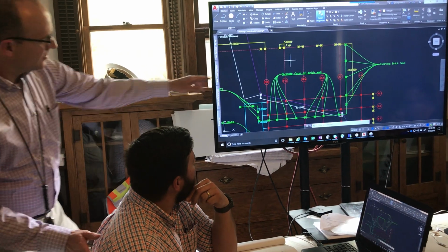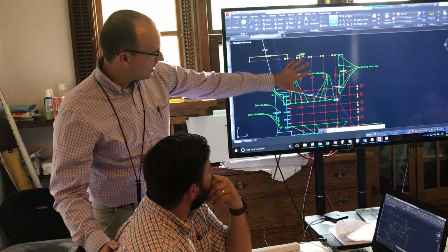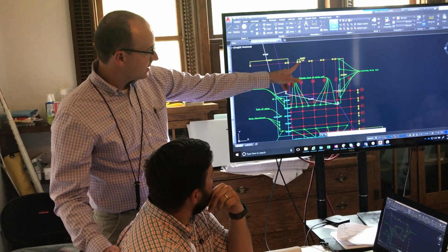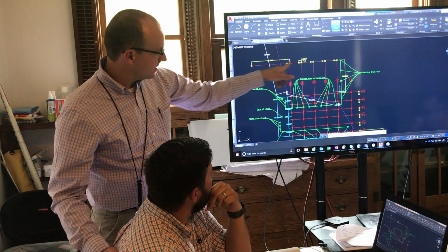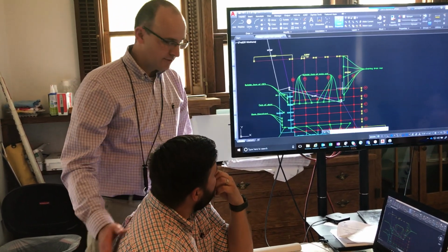Let me just say one thing. So to Jake's point, you can set up a total station. You can set up a robotic total station anywhere. If you set up a conventional total station, you can set up backside, meaning getting a 0 reference, turn 90, and be able to lay out anything that you needed for the red grid lines.